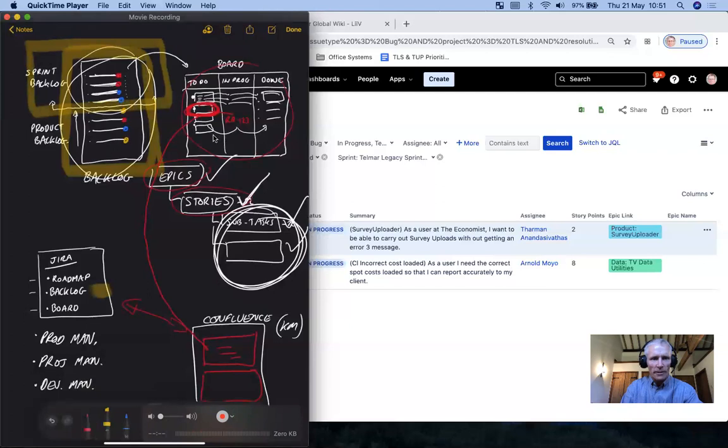In fact, while the development's going on, it's product managers and product owners that will be starting to flesh out and form and groom. That's another term, backlog grooming, the backlog, to reprioritize and make sure that we're elaborating and making sure these next bunch of priorities are sufficiently comprehensive to be able to move into the next sprint and be worked on. So backlog, sprint backlog.